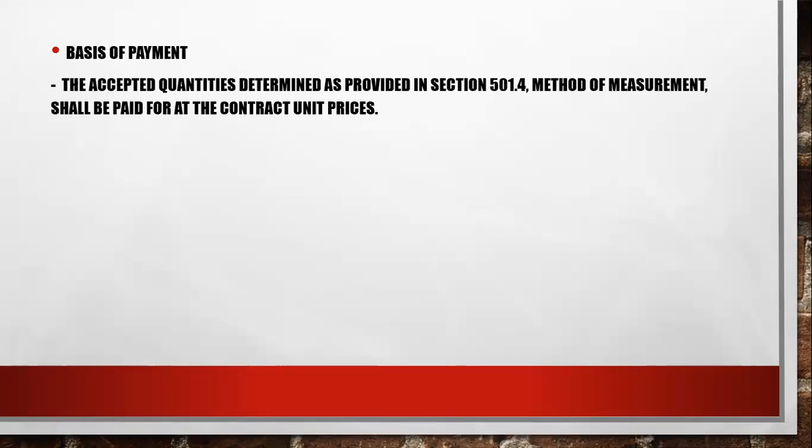So, basis of payment. The accepted quantities determined as provided in Section 514 or the method of measurement shall be paid for at the contract unit prices.